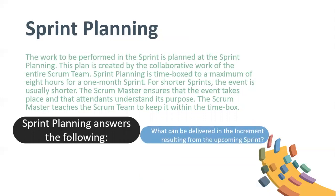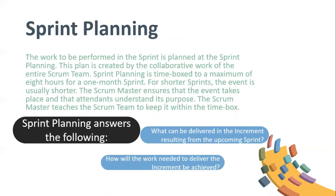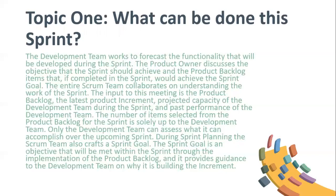What can be delivered in the increment resulting from the upcoming sprint? How will the work needed to deliver the increment be achieved? Topic one: what can be done this sprint? The development team works to forecast the functionality that will be developed during the sprint. The product owner discusses the objective that the sprint should achieve and the product backlog items that, if completed in the sprint, would achieve the sprint goal. The entire Scrum team collaborates on understanding the work of the sprint.